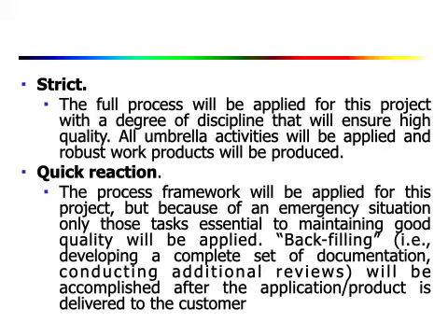So here it will be structured, and the whole framework activities and all the umbrella activities, everything will be applied in a degree of discipline that will ensure very high quality. Okay. Then the final one is quick reaction. Here the process framework will be applied for this project, but because of an emergency situation, only those tasks essential to maintaining good quality will be applied.